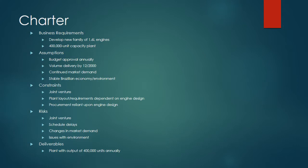Now we'll look at the charter in more detail. It's important to note that this project in reality did not have a charter. This was all the charter that our team developed throughout our analysis of the case study. The business requirements: develop a new family of 1.6 liter engines and build a 400,000 unit per year capacity plant. The goal was really to have a low cost, high quality product.